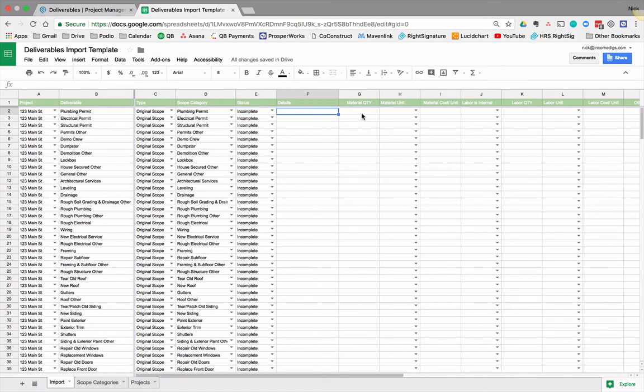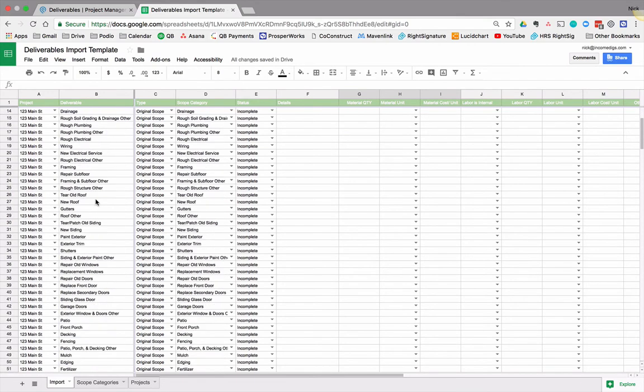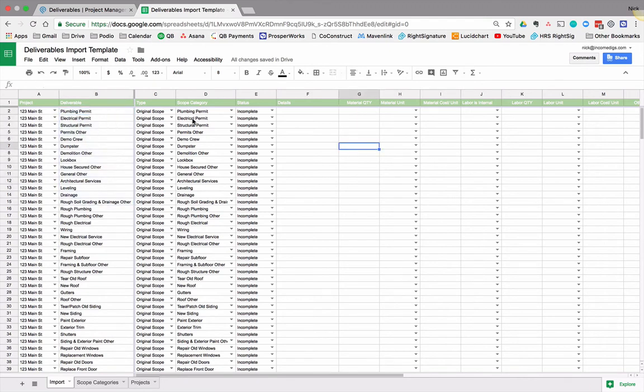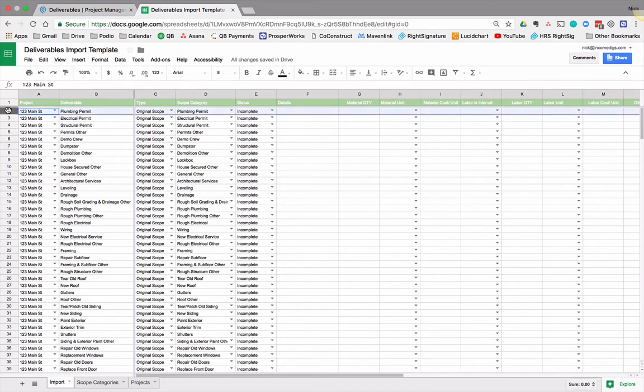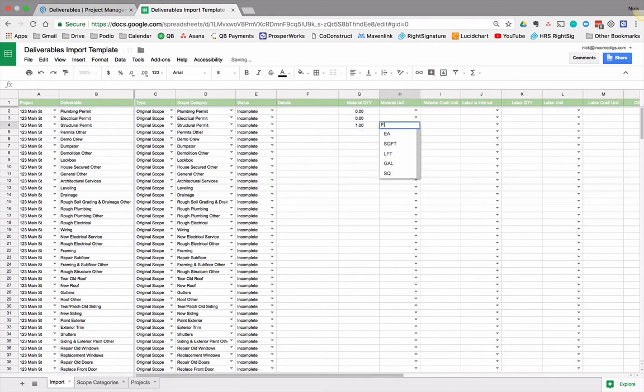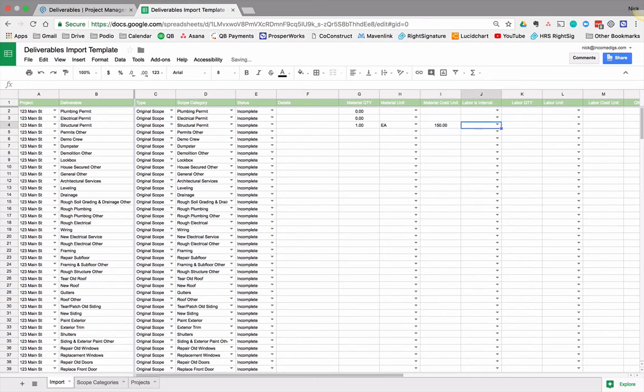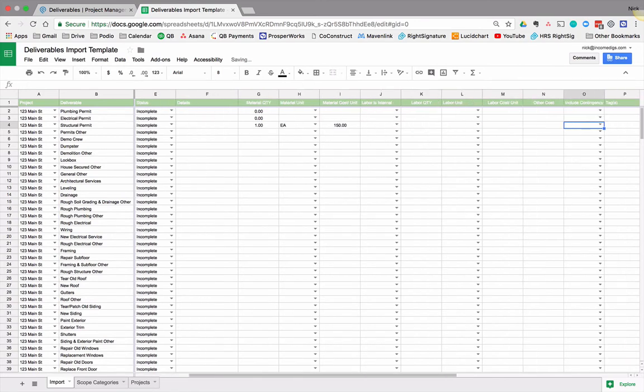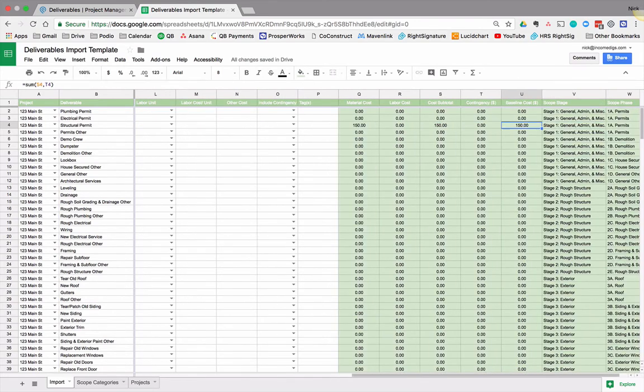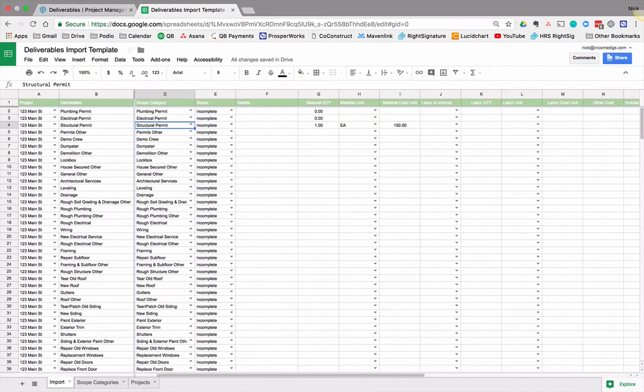Now we can start filling in our material quantities, our labor quantities, et cetera. What this will do if we start here, it forces your project manager to go in this order and think about all these things. Now, if they are not applicable, well, okay, he can delete them or we can just put in zeros, right? So I don't need a plumbing permit. I don't need a structural permit. There's one of those. And let's assume that's going to cost me 150 bucks. And then what we'll do is we'll start getting this baseline cost.